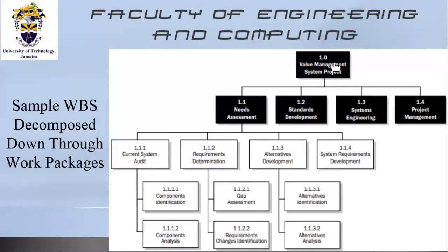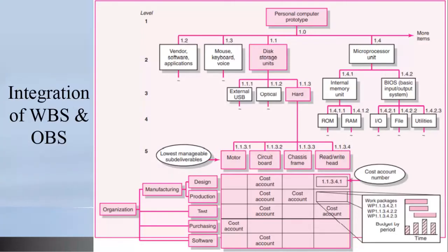All right. So this is level 1. So the number that is assigned here is 1 number. This is level 2. The number that is assigned here is 2 numbers, 1.1, 1.4, those are 2 numbers. This is level 3. The number that is assigned is 3 numbers. This is level 4. The number that is assigned, 4 digits. If you're at level 5, the same is true, right? These down here are going to be assigned 5 numbers.